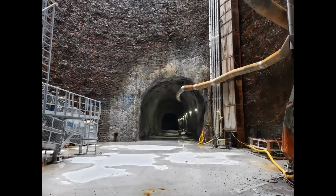Okay, then starter and tail tunnels. The starter and tail tunnels were excavated to help assemble and launch the tunnel boring machine. However, the tail tunnel also helps facilitate a connection of the Coxwell Bypass Tunnel to the future influent pumping station. It's no good for everything to flow to this shaft if it has nowhere to go. This needs to be connected to the eventual integrated pumping station that helps bring it into Ashbridges Bay and treat it.